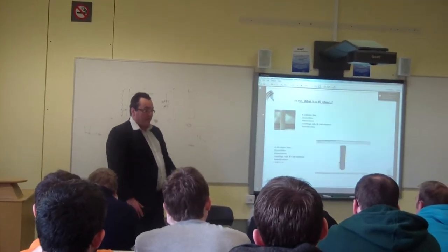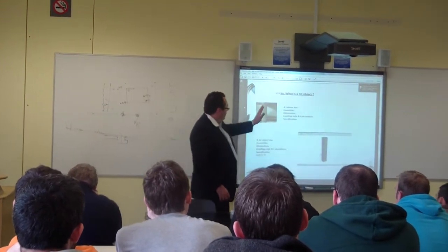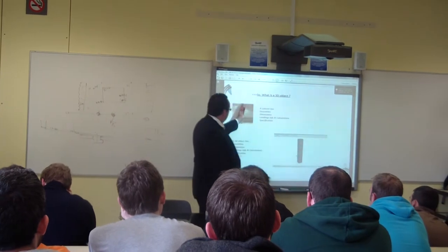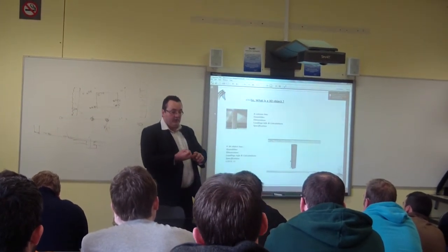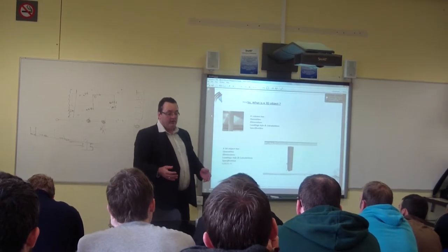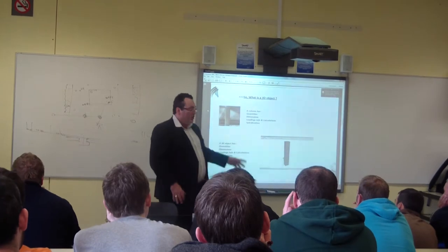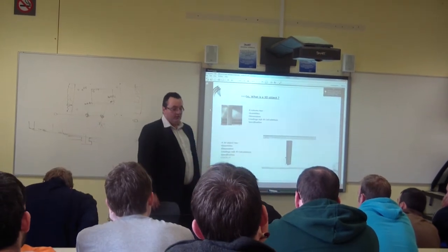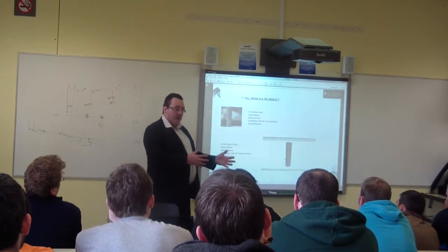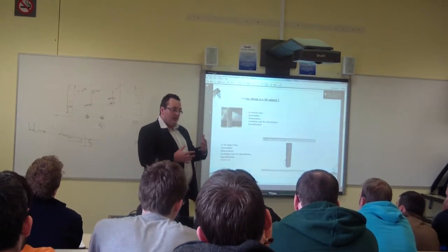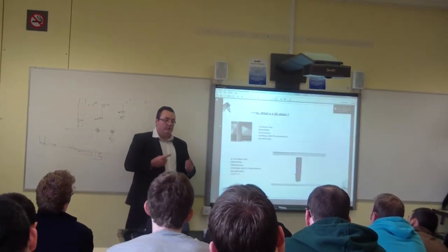Once he designs that on the screen, you have to cost it up. Now, there's two scenarios for how it's going to get costed up. One is a competitive tender stage, where there's one 3D model and you price it up. Or, because you're a switched-on BIM contractor, you do it at the very early stages, where the design team and the contractor are in it together. That's called the multi-party contract.